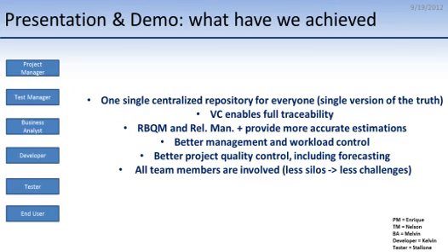In the forecasting section, I would include your requirements trends. As we were looking earlier at your pass and failure rates, as you draw closer to your deadline, all your requirements must become greener, which means all the requirements have passed. If you have a lot of requirements that have failed and that trend only worsens towards the deadline, then you're in big trouble. So this is the type of thing you will be able to use in order to forecast whether you can make your deadline or not.